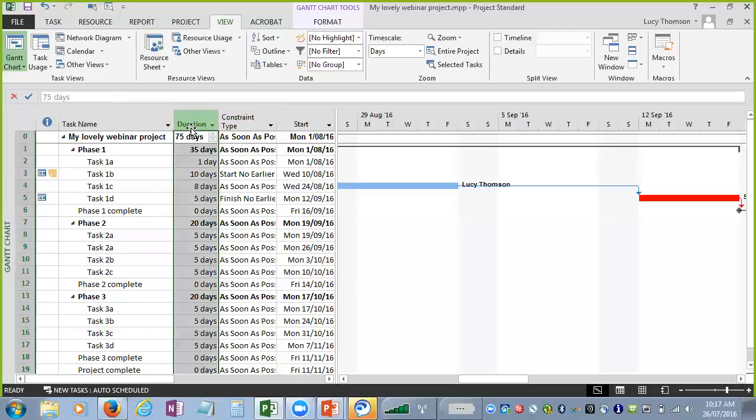See, the thing is that where I've got duration written here, I wish that was called, rather than duration, current estimated duration, because that's what it is. That duration there is a calculated field. It is your actual duration plus your remaining duration. So the duration that has already passed and the duration that is still to come. As I say, I'll just plant that one there. Okay.